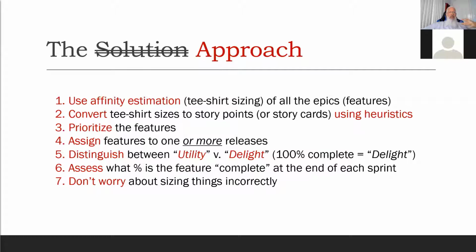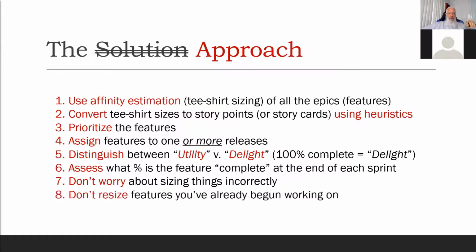I'll simply ask the team, based upon what you are learning, are there any of these features that you need to resize? But I don't resize any t-shirts that are currently being developed. And then lastly, number 8 is don't resize features. Oh, actually, that is my number 8. Don't resize features you've already begun working on. That's almost the same thing as number 7. Number 7 is I tell the team, don't worry about it if you size things incorrectly.